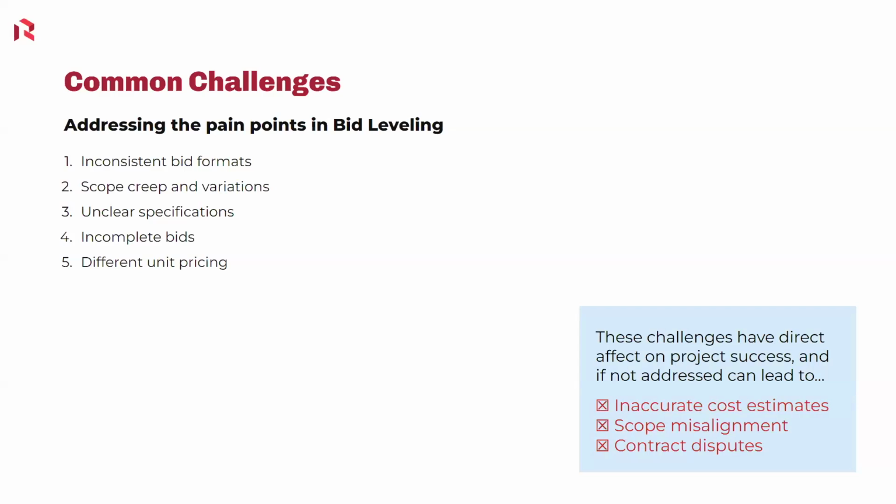Something else that building bid packages is going to help with is unclear specifications. This is just a general one. We all know that if everybody's looking at the specs, people have different ideas of how that's broken down based on what's in the specs. So this is another way that, if we collaborate with our bidders, we can use, as we're going to see today, the bid form and bid packages to start breaking down some of those items in the specifications, and we can collaborate with those bidders to make sure that we have everything that we need included in our package.